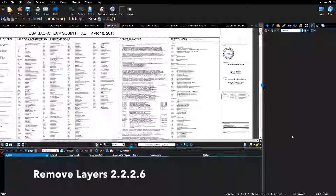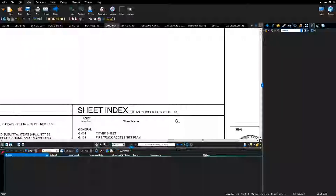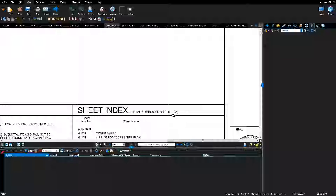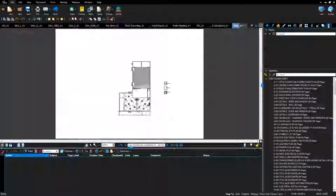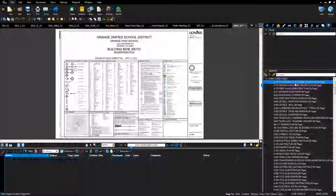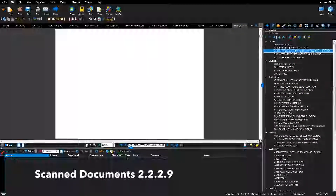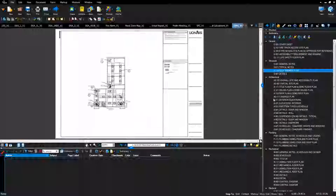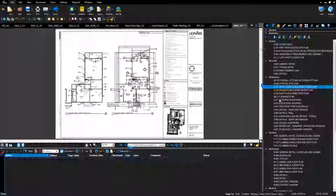Confirm that layers have been removed by selecting the layers tab — there should be no layers listed. Confirm that a sheet count has been included on the index sheet of drawings and that it matches the Bluebeam sheet count. Verify hyperlinks have been created: select the hyperlink listed on the index sheet and verify that all index sheets highlight blue. Verify that scan drawings have been scanned in properly. Select two bookmarks in each section to confirm that render time is less than one second.